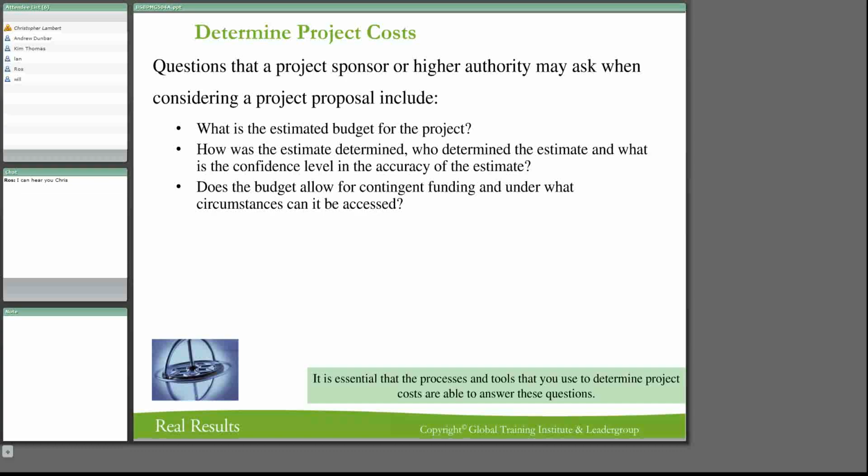And what you're going to look at then is cutoff points. So if the budget goes off course, that this one is going to cost more than what was expected, then we can use some of the contingency funding. If it goes bigger, then obviously there's going to be a determination, well, this is no longer a viable proposition anymore. That's because some projects are difficult to budget for.